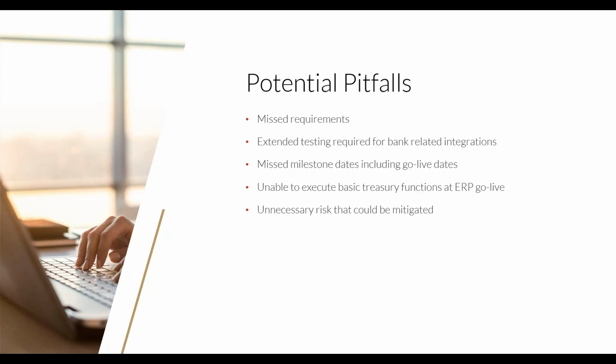An example that I have of a missed milestone was a client that was having their bank create a custom BAI file that listed batched ACH payments separately for the ease of their ERP reconciliation. This bank, which was a new relationship for the client, made two critical mistakes. First, UAT testing went fairly well, with only minor slippage in the development deadlines for the custom file. However, the bank failed to even put the standard prior day file into their production environment. The client had to take their daily cash activity from their test environment for 3 full business days until the bank could promote even the standard file to their production environment. Then the custom file was delayed and not, quote unquote, able to be promoted to the production environment until 2 weeks after testing sign off.